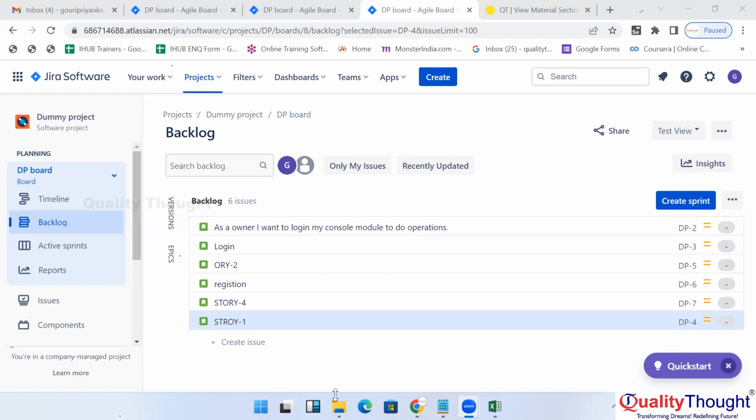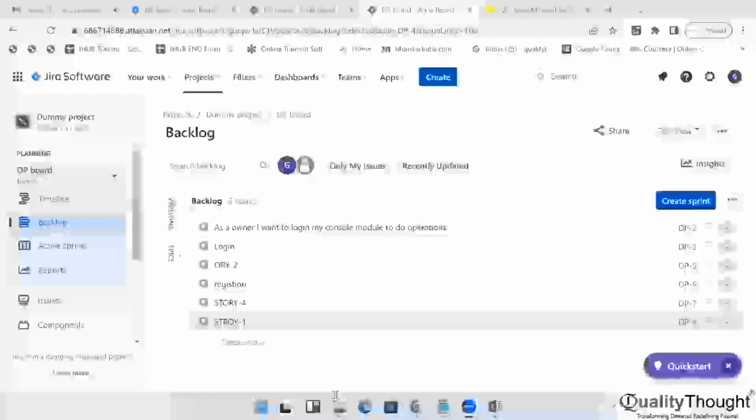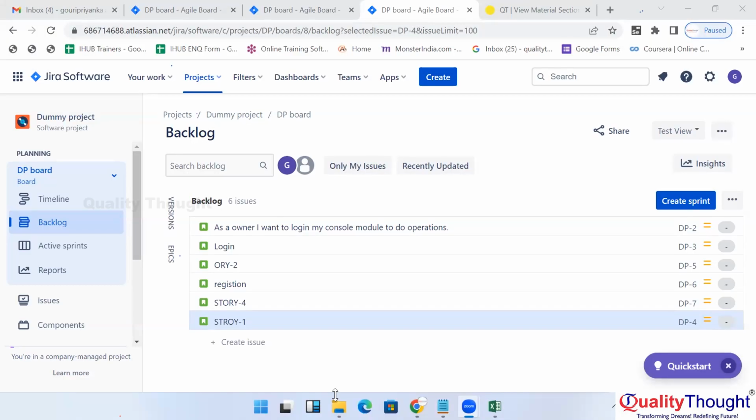Within the sprint only, let's say developers and testers committed to 3 stories. So for the 3 stories, first developers have to write the code in this 10 days of time. They have to understand and they have to write. Parallelly, what is the tester's job? Testers have to understand the requirements, write the test cases and get them reviewed by your team members. And we have to wait for the build. Once we get the build, what do we have to do? We have to execute all the test cases that we wrote for only the 3 user stories.